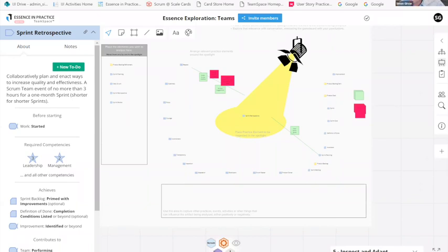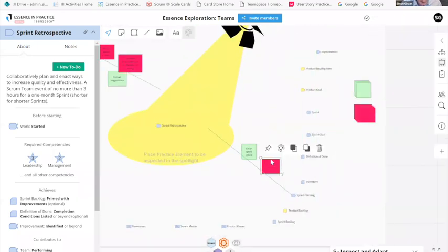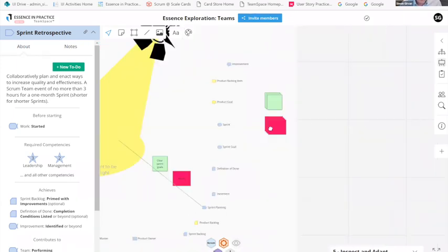Another example here, product backlog refinement and the team being on the same page in terms of following the process. Yeah, reviewing velocity, not acting upon it. That's a great one. If you're using velocity in your sprint planning, you really ought to be including that in your retrospective, shouldn't you? No room for improvement actions. That's a brilliant one. Yeah, I'll write that down. So we'll put velocity here and improvement actions. And actually prioritization of improvement actions as well as no room. Sometimes in no room, there's always room, right? But only if you prioritize them.